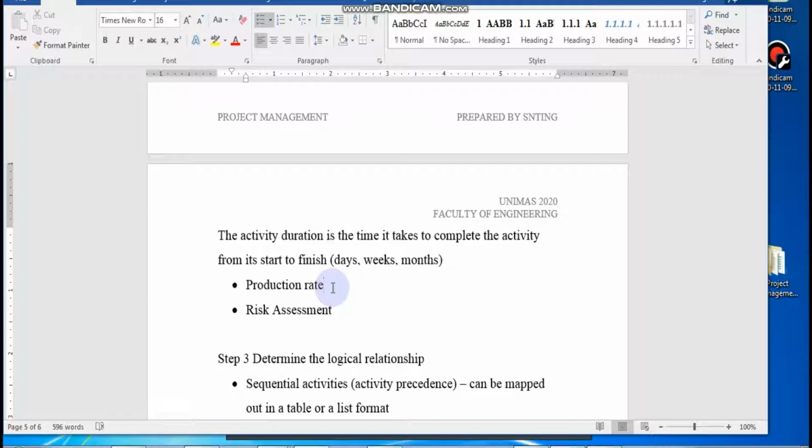If I say my power machine can do 10 pounds a day with this particular soil condition, all factored in already, that's about 10 pounds a day. So if I have about 1,000 pounds to do, that means I need 100 days.